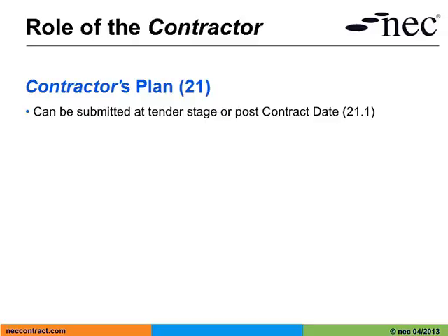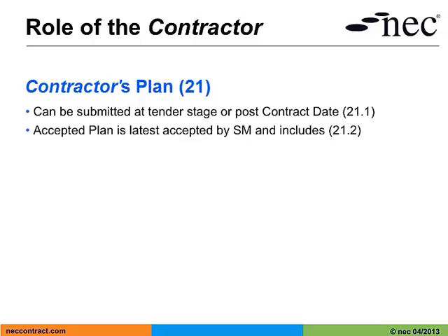If the service manager is not going to accept the plan, he has to provide his reasons, and these reasons are stated in the contract. The accepted plan is the latest plan accepted by the service manager.